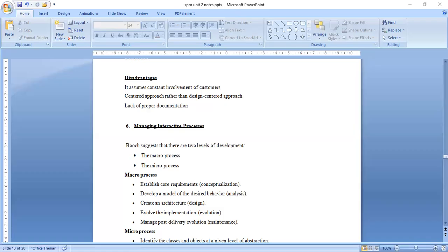mind is the COCOMO model. Okay, so COCOMO 2 is the latest major extension to the original COCOMO 81 published in 1981. It consists of three submodels, each one offering increased fidelity the further along one is in the project planning and design process. Listed in increasing fidelity, there are three submodels in COCOMO 2. The first one is application composition, second one is early design, and third one is post architecture models.